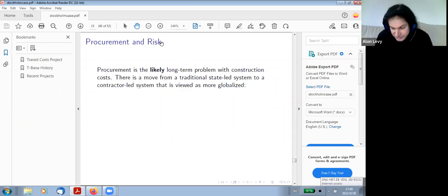So what is the problem? As I said, the construction costs are low, but they're rising. Now, for the cost overrun, there's a list of internal reasons. For example, at one point, they changed the regulations to require a third bore, a drilled tunnel. Normally you drill 2 tunnels, one for each track.